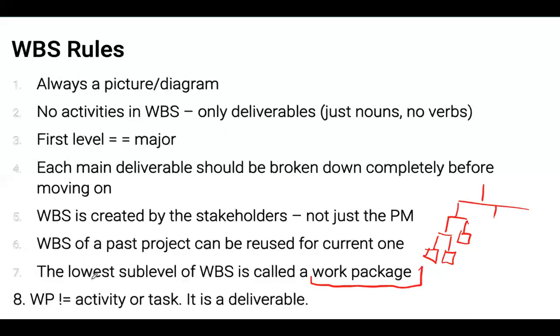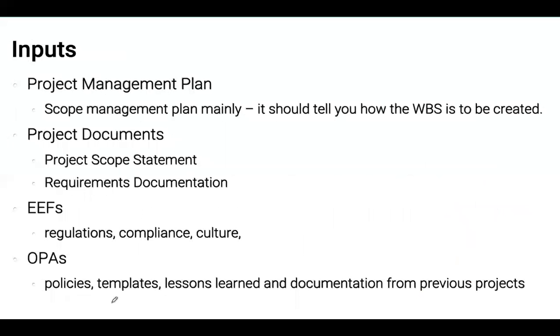And again, a work package is not an activity or a task. It's a deliverable. So within that deliverable, through activities in different knowledge areas of project management, we're going to identify activities required for reaching the deliverable that's required. Okay, so nouns, not verbs.